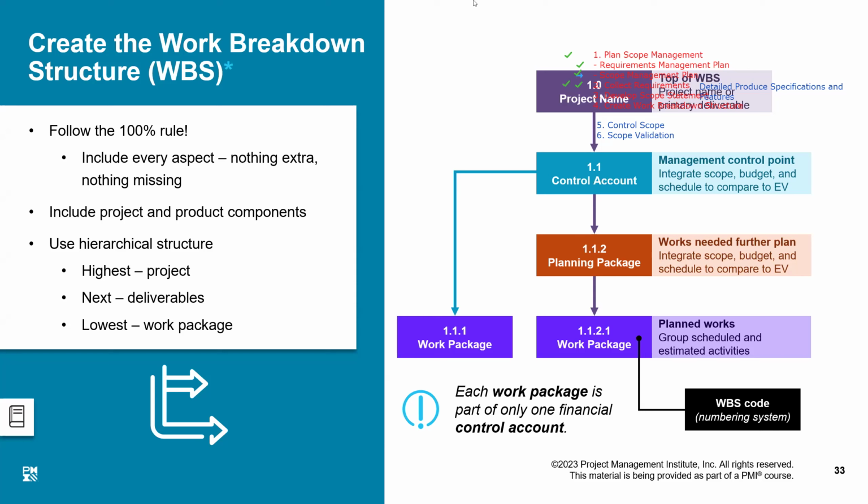You have, say, 100 tasks and 50 of them have been done. Is it 50% progress? No, because it depends on how small each of them is, and how big. That is the point. Where did you consider that?